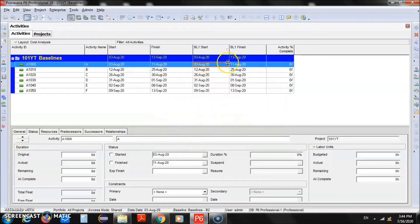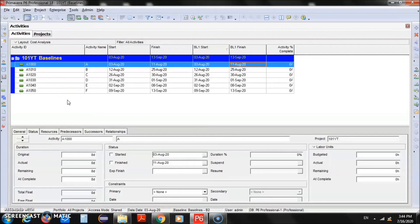During execution or while still in the planning phase, if you change any settings — add activities, change durations, costs, or anything else — you will need to recreate the baseline. If you changed durations or dates, first regenerate the schedule, then recreate the baseline, then assign that latest baseline — whether it is B3, B4, or B5 — to your current project.